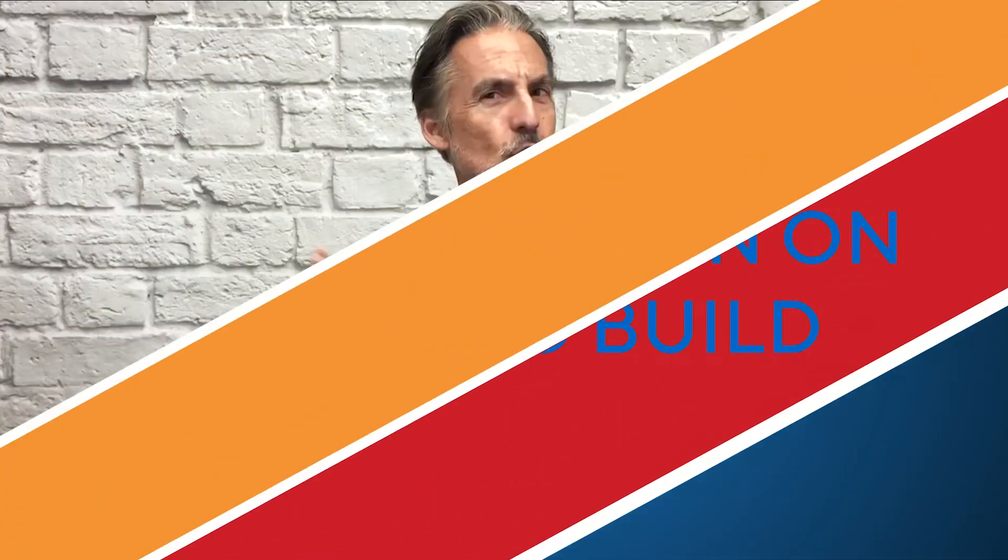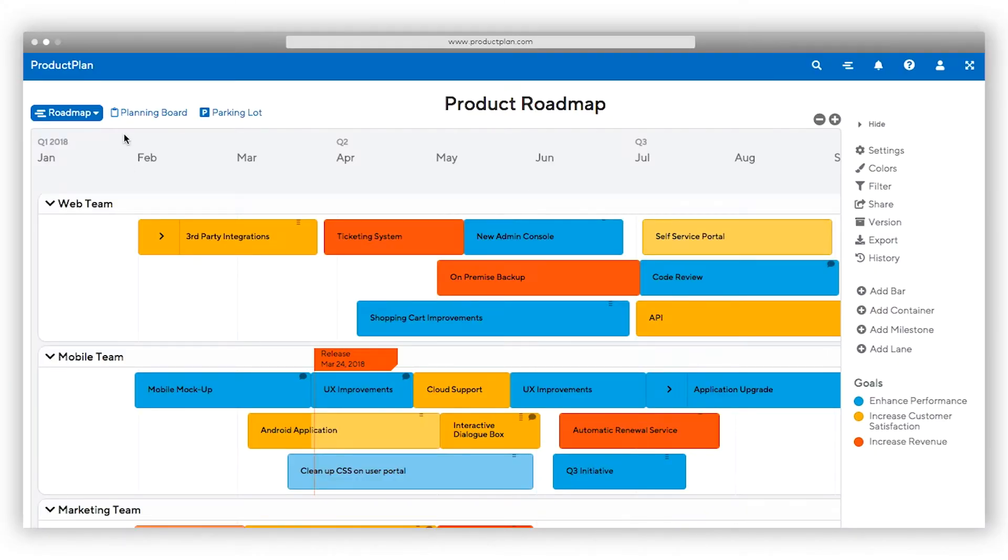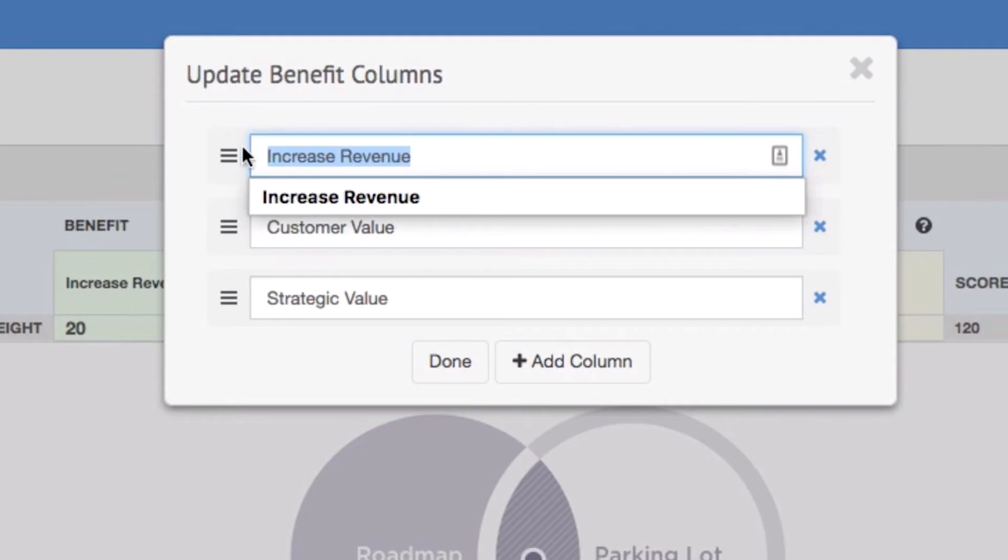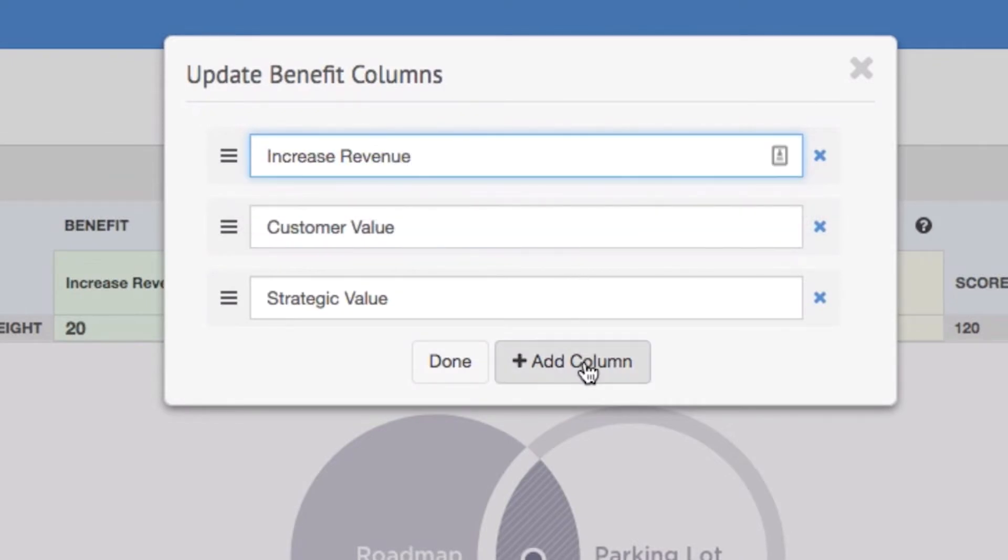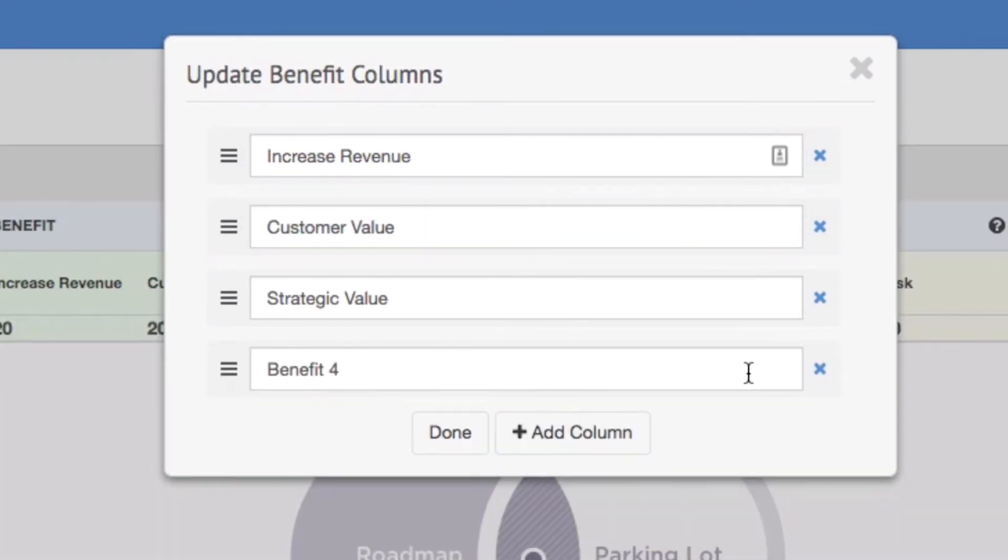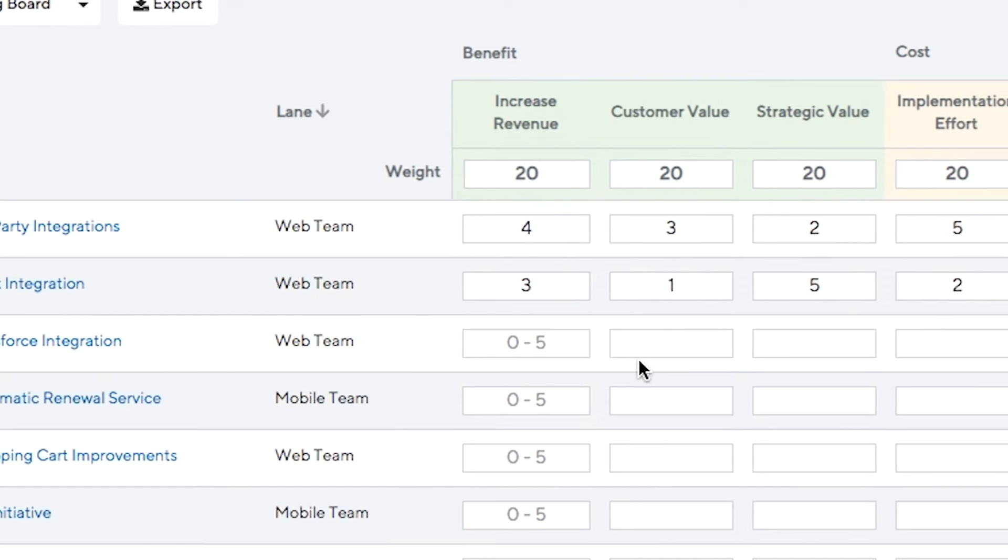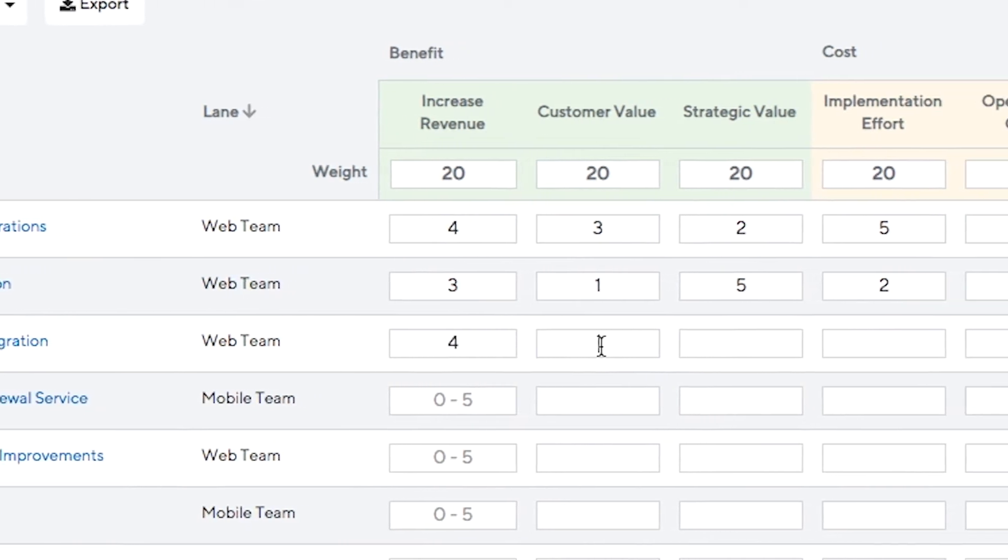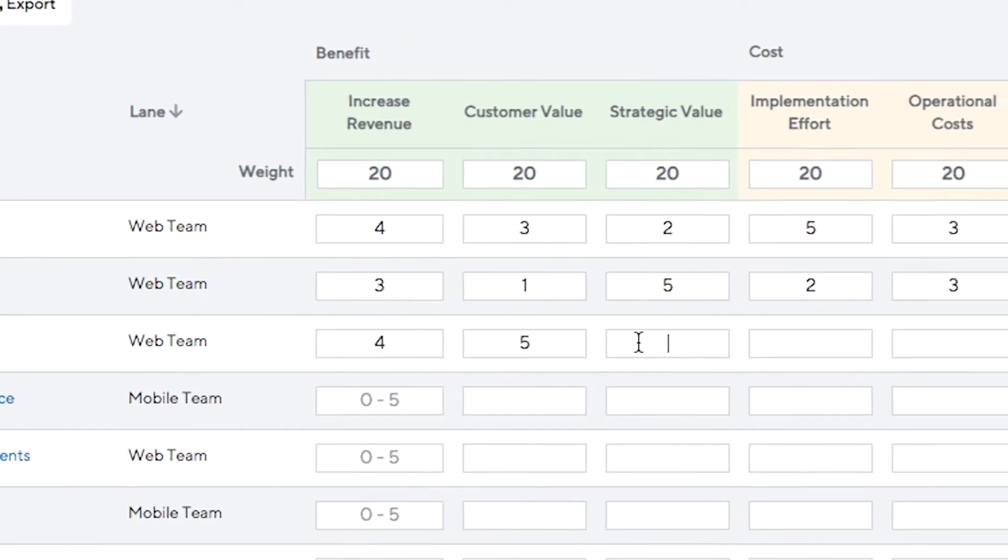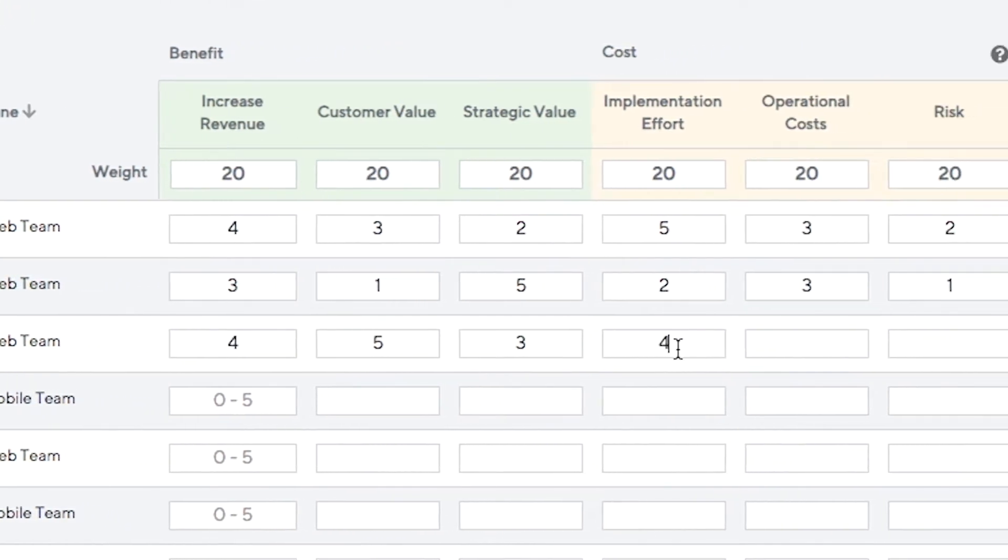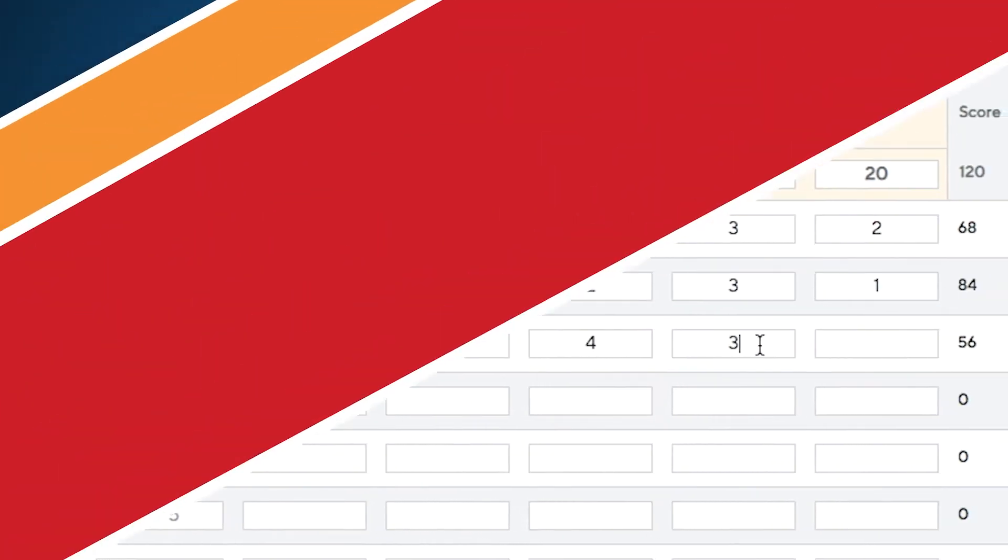Not sure what the highest priority is? Use the planning board to guide your strategic decisions. Here, pull together ideas from your parking lot or items already on your roadmap, and score your initiatives objectively. Our weighted scoring model of benefit versus cost helps you determine which items have the most value to your customers or business.